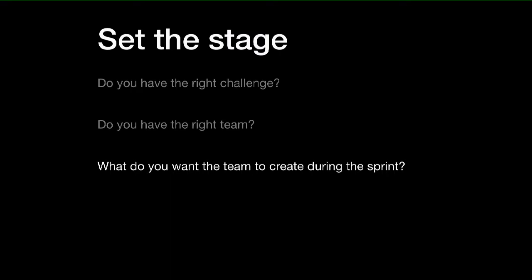So at this stage, we've answered these questions. I'm going to go over some of the processes at a high level because this isn't a talk on sprints specifically. But I just want to call out that just because these are predefined methodologies in a framework that Google Ventures has created, it doesn't mean that you have to follow these to a T. We don't. You can definitely take bits and pieces of it and still extract value from it. For example, sprints are typically 5 days long, but you can still do a sprint in 3 days and really get value from it.